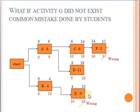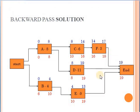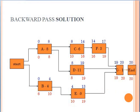Always connect all ending activities to an end node. When you connect them to an ending node, you will determine the completion time of the project and remember to go backward from that point, avoiding these mistakes. Since G was connecting all activities in our example, you didn't see a problem — but if G didn't exist and you forgot the ending node, you would make those errors. So the network should always have a proper ending node.